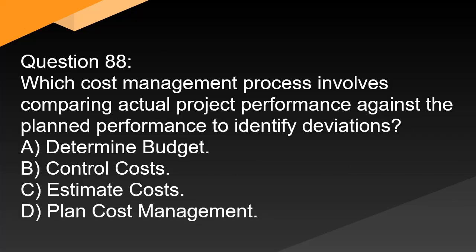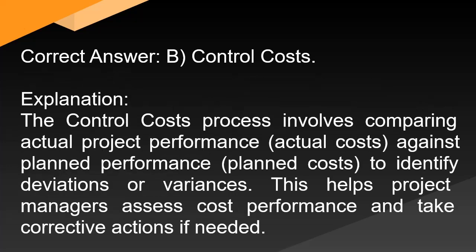Question 88: Which cost management process involves comparing actual project performance against the planned performance to identify deviations? A. Determine budget. B. Control costs. C. Estimate costs. D. Plan cost management. Correct answer: B. Control costs. Explanation: The control costs process involves comparing actual project performance (actual costs) against planned performance (planned costs) to identify deviations or variances. This helps project managers assess cost performance and take corrective actions if needed.